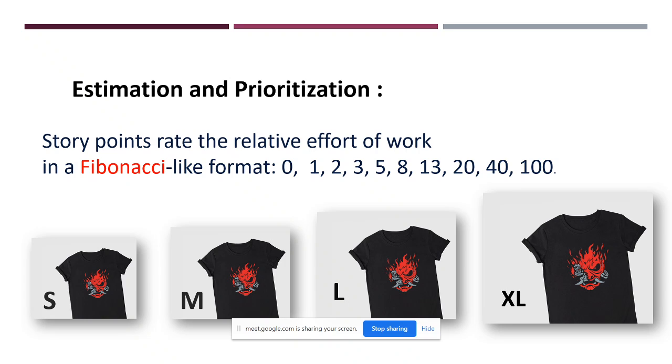It's a fixed one. Like this, for a user story, sorry, two story points is fixed. But for these two story points, you may take 2 days, I will take 5 days, or maybe someone will take 1 day, or somebody takes 3 days, right? So this will be based on experience.